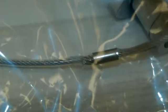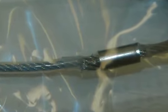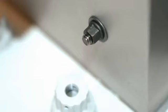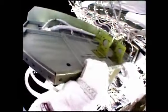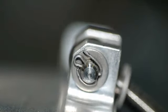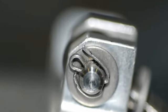We have fixed hardware late in the flow. We file down sharps, we take threads of screws that are protruding through structure and put a cap over the exposed threads so that a crew member doesn't reach behind the structure and cut their finger on those threads. I think the lesson we've learned is sharp edges are very real, and it's crucial in the design phase and in the delivery time frame to verify that your sharp edges don't exist.